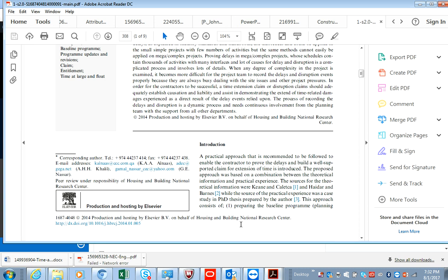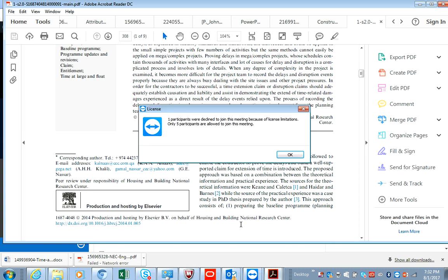Anything that impairs contractors' performance, you raise an early warning notice, right? Anything that impairs quality or performance or the usefulness of the goods, you raise an early warning notice, right? And anything that affects planned completion, you raise an early warning notice. Now, with that in hindsight, that would mean that any issues or any risks to the project for which you have raised the early warning notice that may have an impact on the delivery date, the contract completion date itself,